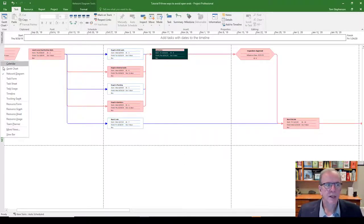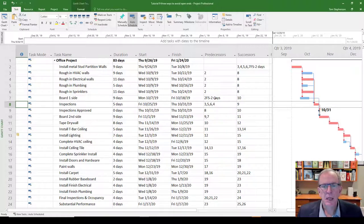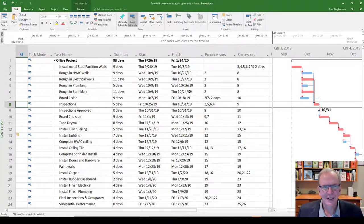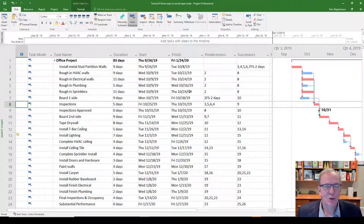I can slide back to my Gantt chart and now see the completed, properly linked activities. In summary: make sure everything is connected in your projects. If someone tells me an activity doesn't need to connect to anything, I'll ask why it's even in the schedule. Project Management Institute says include 100% of the project in the schedule — don't include things that aren't involved. I'm Tom Stephenson, wishing you a wonderful day — click subscribe or see the description for more tutorials.